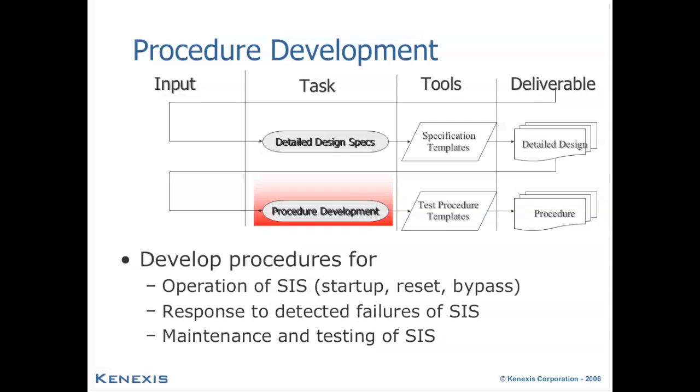And there are test procedure templates that we use to ensure that each type of equipment is properly and thoroughly tested, such that the assumptions that were used when we did those reliability models for how frequently and how effectively things are being tested are borne out in practice with a robust design, in this case, a functional testing protocol.